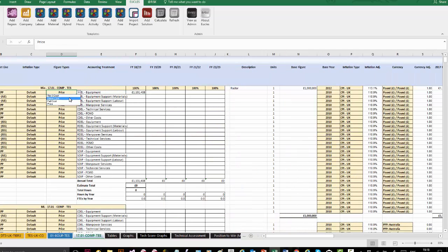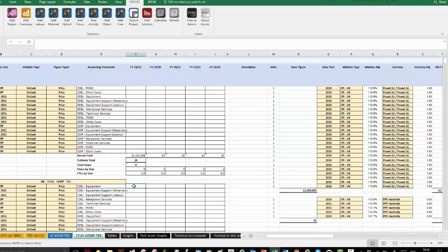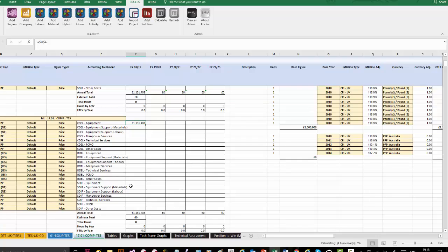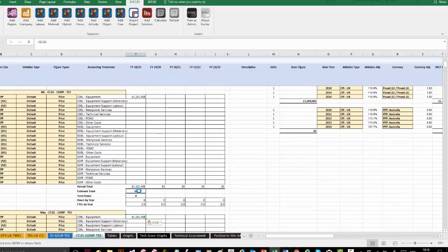And when we get onto the next lot of tabs, you'll see that actually we're going to turn all of these into prices. So I've given it 2 different types of cost. So that is a cost without all our indirect overheads on, and Euclid will account for that because I've already told it that this is a direct cost. And the labor estimate that we had before, that's not going to add on indirect overheads because it's already got them. It's going to just add on sort of profit margins, other things like that. So that's how I'm communicating to the tool now.